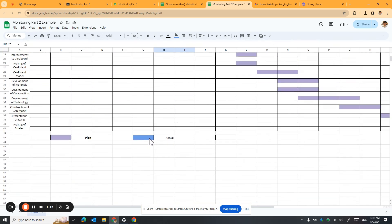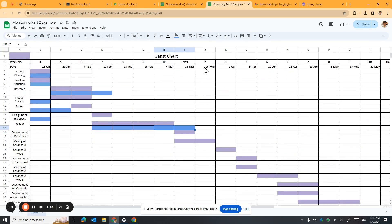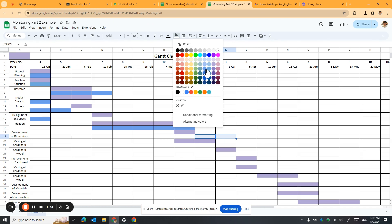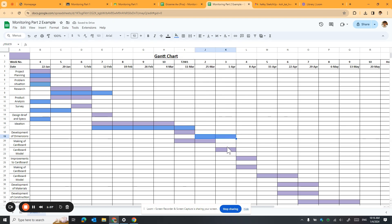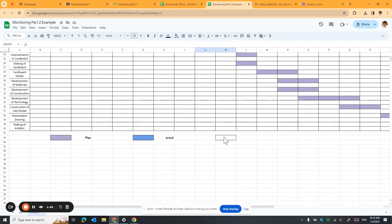The legend shows 'actual.' From 25th March onwards I'm actually doing my dimensions, which I'm still doing. So by the 1st of April I should be making a cover model, but I'm not making one yet — which means I'm falling behind schedule, so we need to do a revised plan.